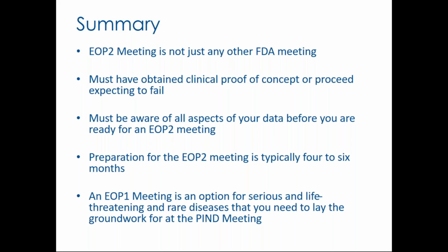So in summary, the end of phase 2 meeting is not just any other FDA meeting. We must have obtained clinical proof of concept in order to proceed to an end of phase 2 meeting, or proceed expecting to fail. You must be aware of all aspects of your data before you are ready for an end of phase 2 meeting. And the preparation of the end of phase 2 meeting is, in our experience, typically 4 to 6 months if it's done well.